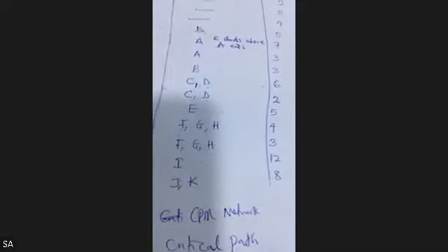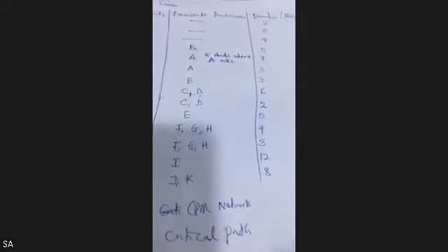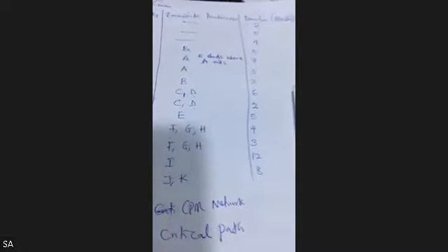When you see that some events or some activities are terminal activities, every other activity towards the end must end at that particular terminal activity. So you can have 2 or 3 letters that are terminal activities. All terminal activities go towards the last ending point. Let's take note of that. So L is a terminal activity. You can see that L does not occur elsewhere.